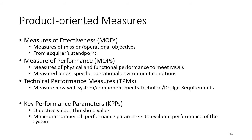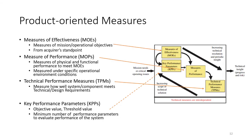The System Engineering Handbook also identifies key performance parameters (KPPs), which are related to the measures of effectiveness and are parameters particularly important to the product definition or the project. A diagram in the handbook illustrates the flow: MOEs lead to KPPs, which flow down into measures of performance covering physical and functional measures, which in turn flow down into technical performance measures of the actual design and technical implementation of the requirements.